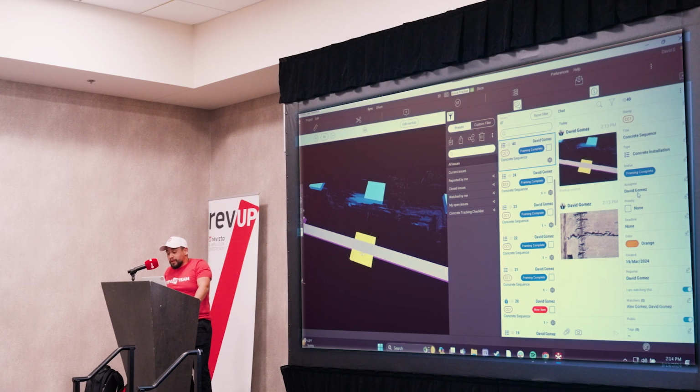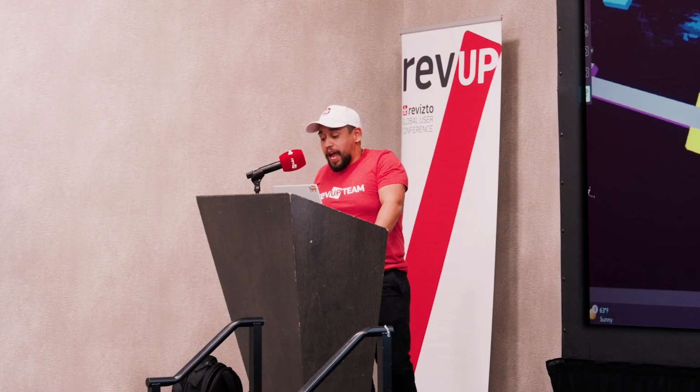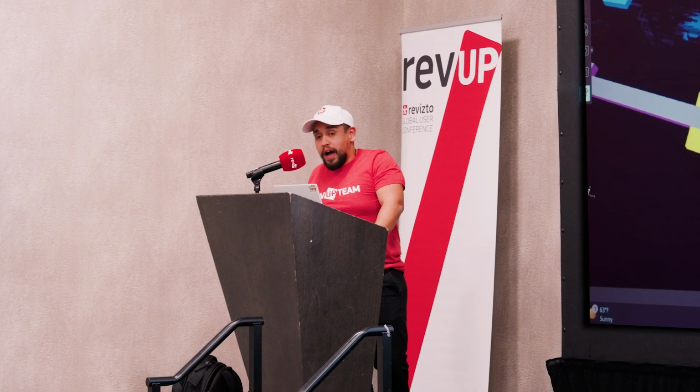And so now we do have our different types of custom statuses that also coincide with this. So we're also underlining the fact that we're not only applying a notification via the model in its visualized form, but now we have the status of that issue as a way to track. So now we could say we're moving ahead and applying a discrepancy status as a way to have that assigned to the correct person. Maybe the self-perform team on the project can then be assigned to that issue itself.